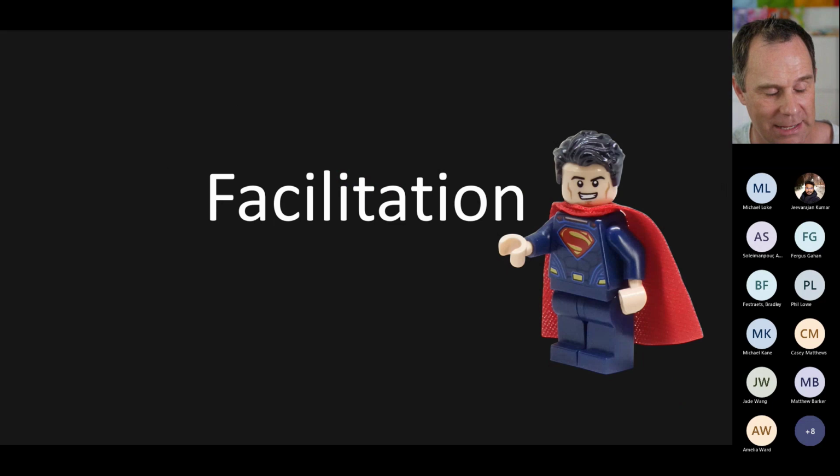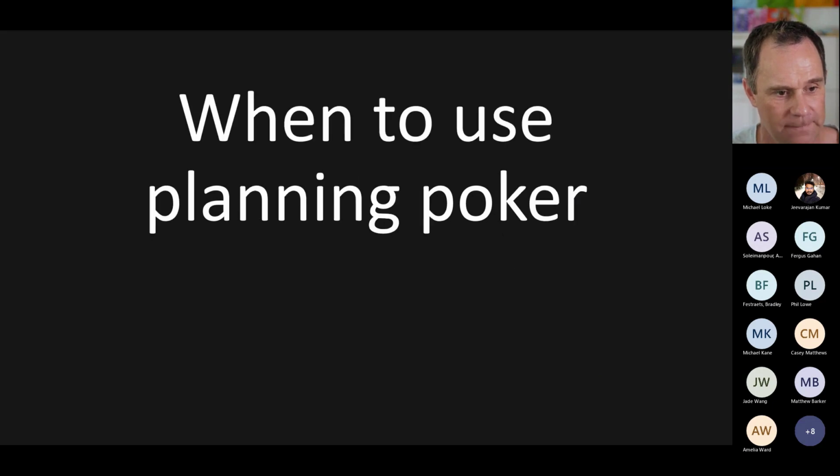Some teams playing planning poker can get bogged down and spend 15 or 20 minutes per story. You do need a good facilitator to keep things moving, to time box your discussion, and to keep a tight rein on the facilitation. So get a good scrum master. I find that's a challenge.